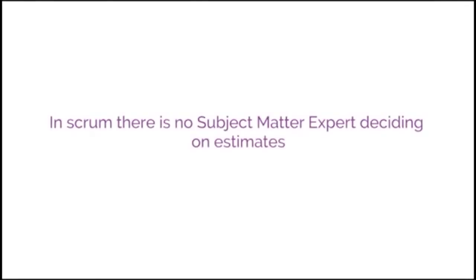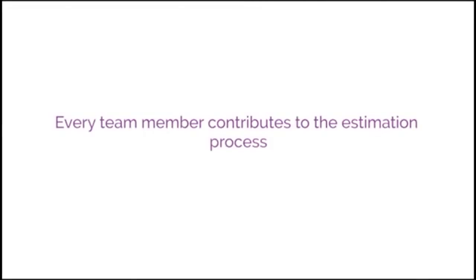In Scrum, there is no subject matter expert deciding on estimates. Every team member contributes to the estimation process. So everyone gets an opportunity to estimate what they think, and then give an opportunity for the team members to convince each other why it should be bigger or smaller. In a lot of cases, you'll find, oh yeah, I didn't think that we also had to do that task with the server.